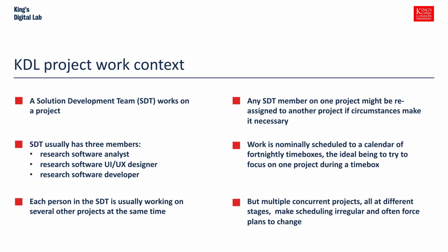Now, the next point is absolutely crucial. If you take nothing away from this, keep this in mind. Each member of the SDT is going to also be working on at least one other project at the same time, and not usually one other project, actually more like 2 or 3 other projects at the same time, as well as doing other work, lab-based work, sometimes pre-project work, evaluating proposals, that kind of thing.